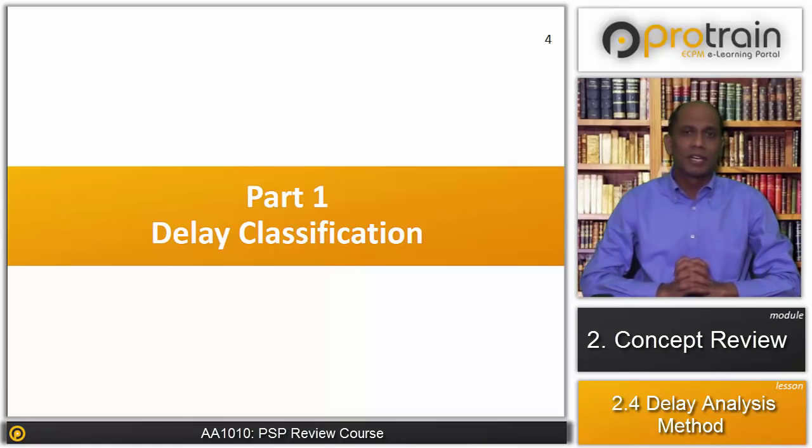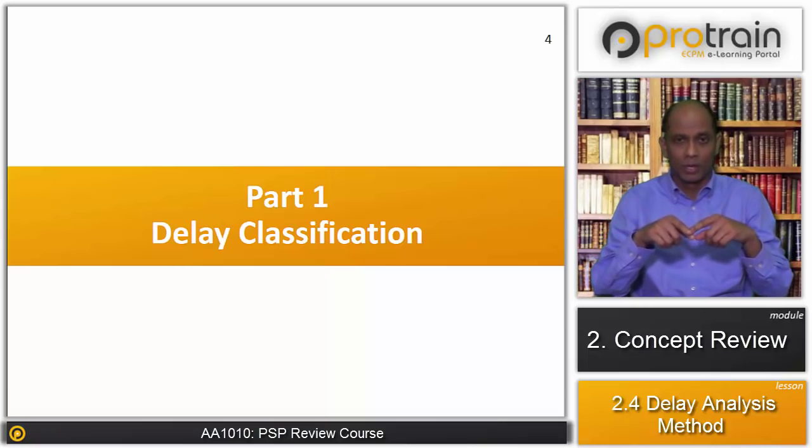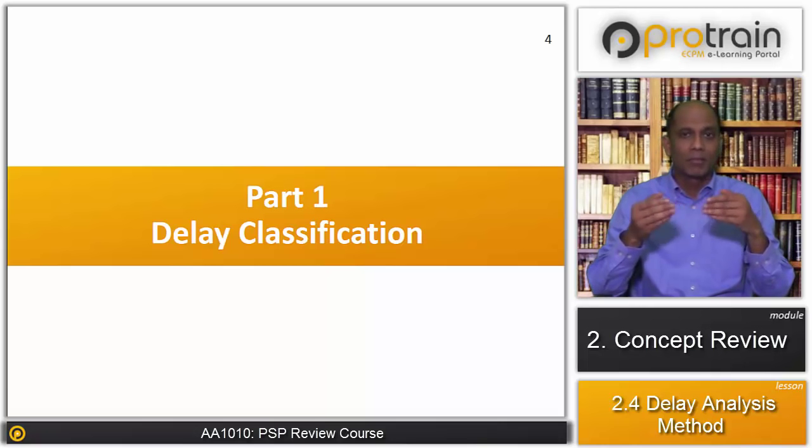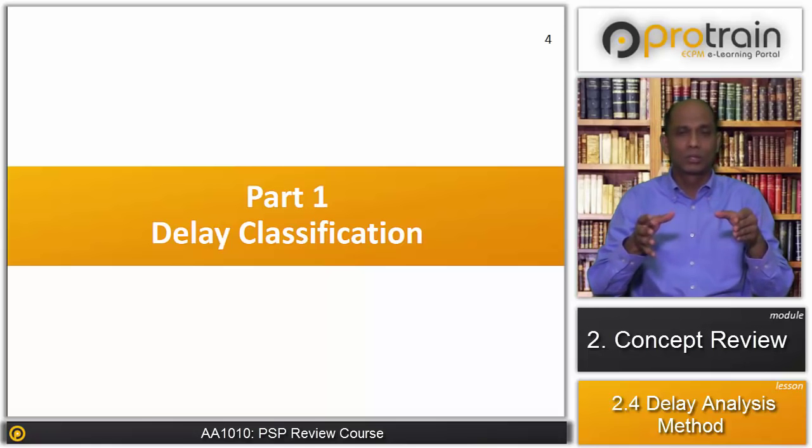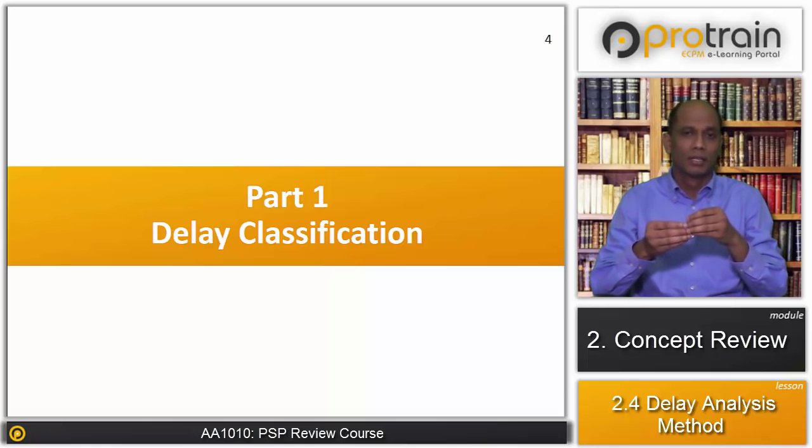Delay classification is required because when we talk about delay, we are going to talk about two things: the time extension to the project and the cost associated with that particular time extension. So it becomes important to classify the delays so that we can relate the types of delays to extension of time and the associated cost. This is why we need to understand delay classification.